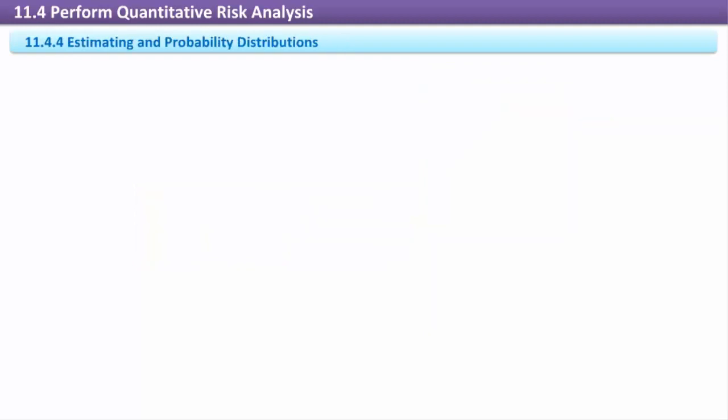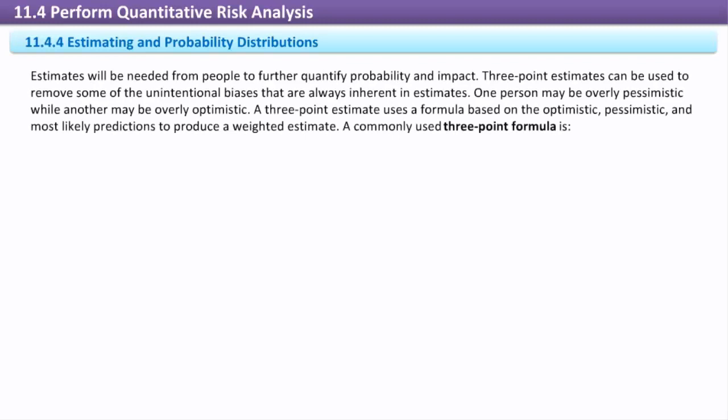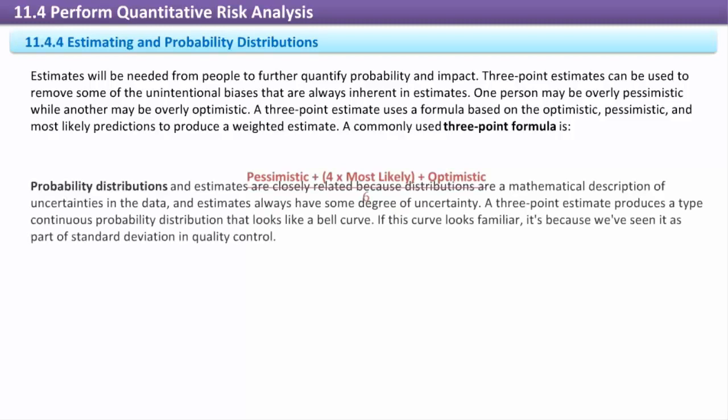Estimating and probability distributions. Estimates will be needed from people to further quantify probability and impact. Three-point estimates can be used to remove some of the unintentional biases that are always inherent in estimates. One person may be really pessimistic while another may be really optimistic. A three-point estimate uses a formula based on the optimistic, pessimistic, and most likely predictions to produce a weighted estimate. A commonly used three-point formula is pessimistic plus 4 multiplied by most likely plus optimistic divided by 6.